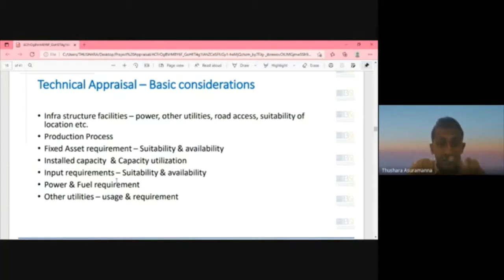In case of after sales service on some machines, we need to look into that. Maybe it's good that you bring down some machinery from France or Germany, world class, but when you put everything here, in case of emergency, do we have somebody to look after it, maybe not in Sri Lanka, even in India, to come and give support? If not, that's not suitable. Maybe world class, but it's not suitable to Sri Lanka. Maybe also the availability of machinery replacement, some part replacement, whether those parts are available.